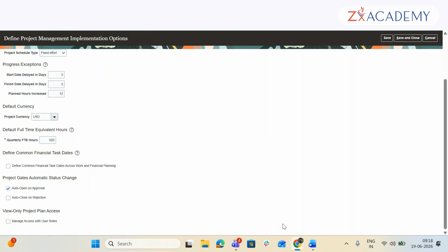And is this connected with the common task dates? Because when we complete each task, will it ask for approval, something like that? Yes, correct. Deliverables are your tasks only. So in the front end, for each task, you can also attach the deliverables. My task is completed. I am responsible to create four pillars. I have created four pillars, so I will complete my task one. My task one is completed. But I need to attach the deliverable document also. So each task has a deliverable.